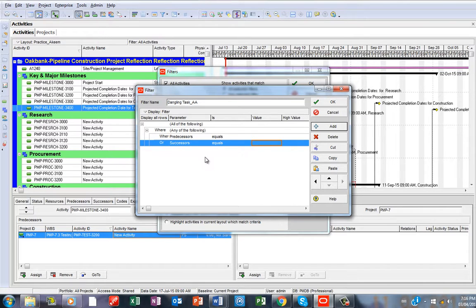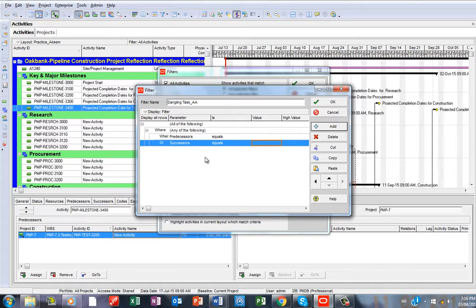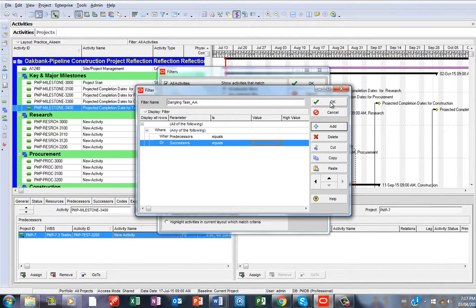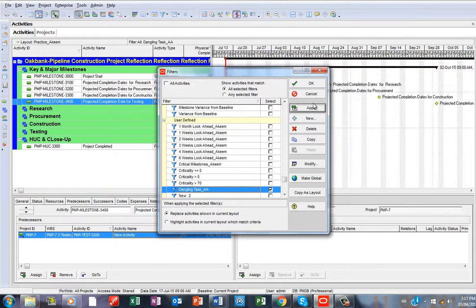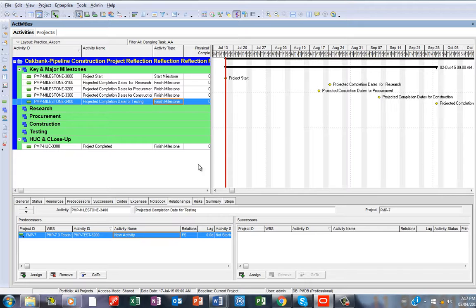By doing this, the filter will look for tasks that are not properly linked, so you can easily work on them and link them up together. Now I'll say OK and apply.